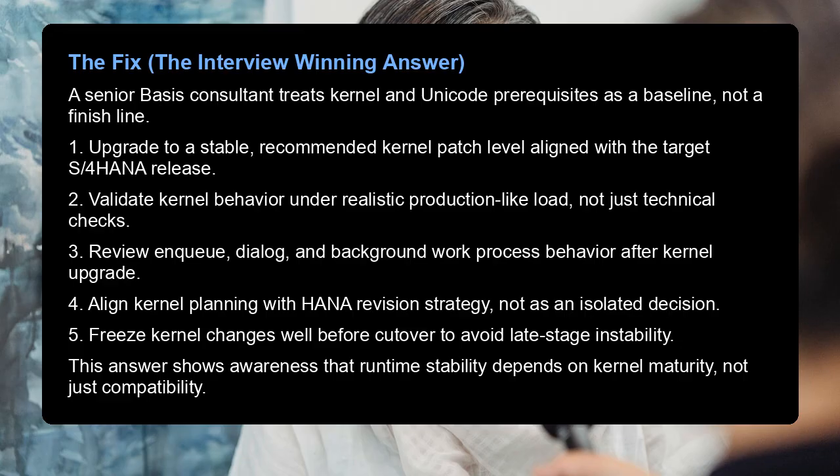1. Upgrade to a stable recommended kernel patch level aligned with the target S/4HANA release. 2. Validate kernel behavior under realistic production-like load, not just technical checks. 3. Review and tune dialog and background work process behavior after the kernel upgrade.